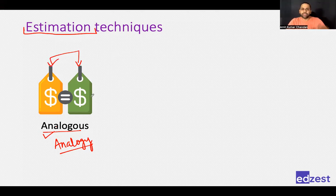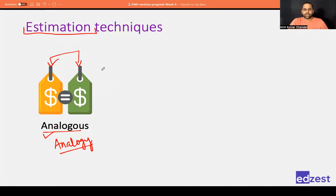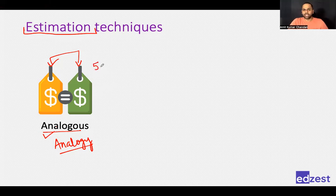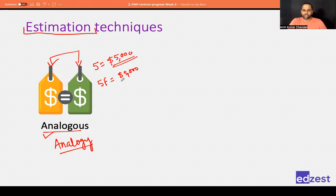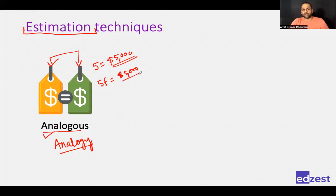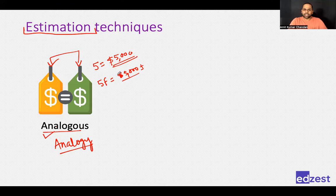For example, if painting five floors in your previous project cost $5,000, and you are doing a similar five-floor task now, you should take $5,000 as your estimate because that is what it actually took last time. Plus or minus whatever range you want to add is fine, but this is the number you should be taking. This is called analogous estimating — comparing like-to-like things.